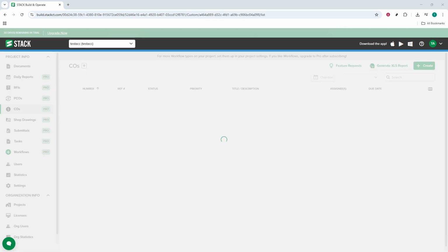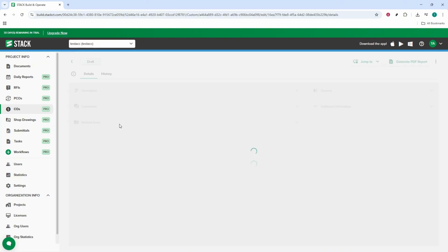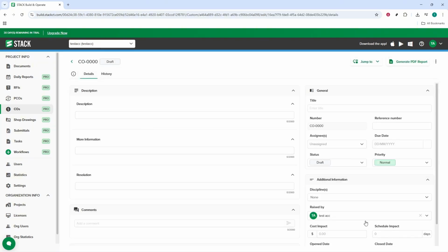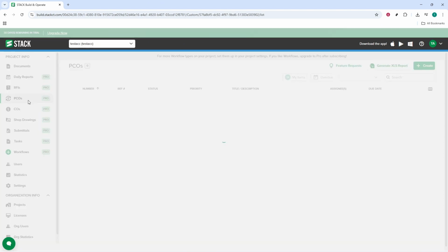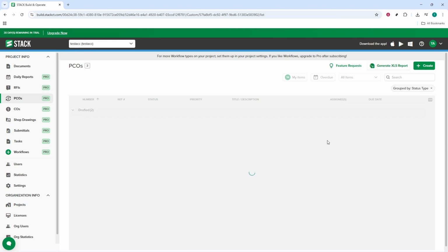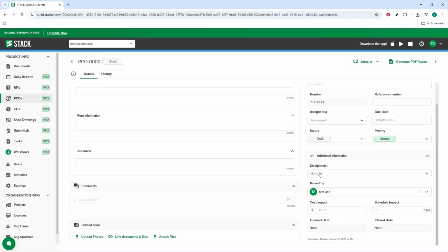Finally, review your budget versus actual reports. Depending on your subscription, you'll see cost and production views that compare estimated and actual quantities, estimated and actual labor hours, and variances by cost code or trade. Focus on over-budget items, productivity gaps, and early warning signs. The sooner you catch a variance, the easier it is to correct course.